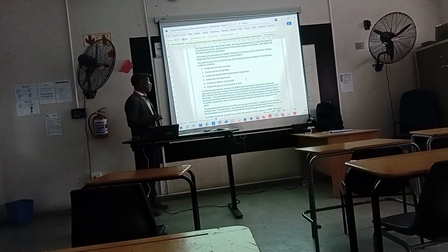The audit found that many of the problems lay with inadequate management of the project, and the evaluation of the performance of the service provider was often lacking. In certain schools, there was no evidence that stolen equipment had been reported to the police.